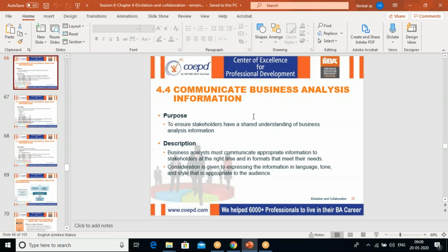So he came up with a change request directly, and later on he escalated it. The original format was in this way and you changed that format later on. Now what I'm trying to tell you is that whatever format the stakeholder is comfortable with, you have to follow it as much as possible. And if you are changing that format, you have to take approval for it.